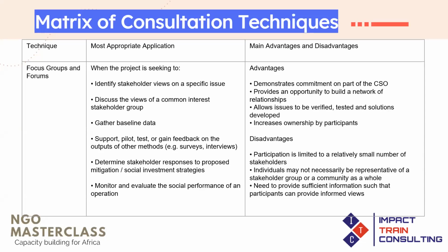Now, the disadvantage also, just the same way with the workshop, focus group discussions limit the number of stakeholders that can participate, and individuals may not necessarily be representative of a stakeholder group or a community as a whole. You will need to provide sufficient information such that participants can provide informed views. And if you do not have the right facilitator, you see that some persons will just dominate the discussion and others will not be sharing any information in that forum.